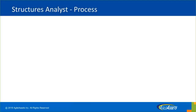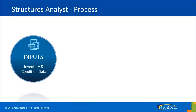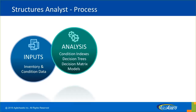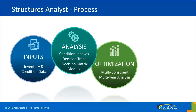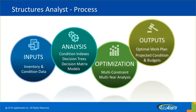Let's see how the Structure Analyst works. Data starts with inputs — inventory and condition data are stored in the system. If you are using Structure Inspector, it can be linked, or it can use inventory and condition data stored in the system itself. The second part is analysis, which generates condition indexes for the inspection and inventory data. Then the decision logic you define and deterioration models in the system — based on the what-if scenario you define with multi-constraint, multi-year analysis — the optimization solver will produce the optimal work plan, project conditions, and budget based on those constraints.